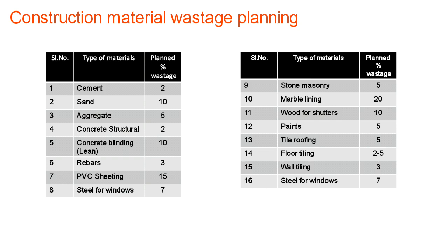For construction material in any project, under wastage planning, there is something called allowed wastage or unavoidable wastage in a project. For each of the materials in a project, there will definitely be a certain amount which will go as losses or wastage, and if it goes beyond that, then that will not be considered acceptable, and that will question the quality of work.